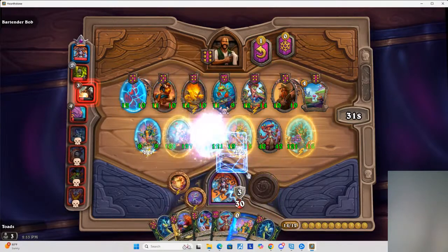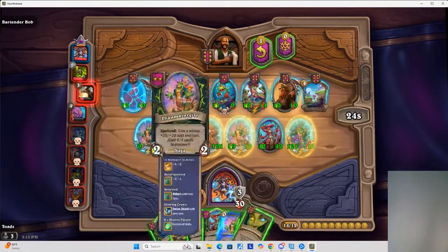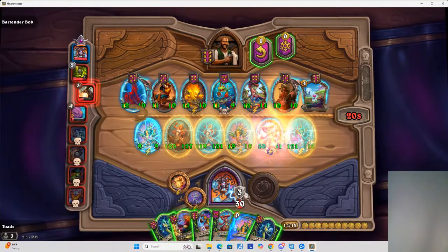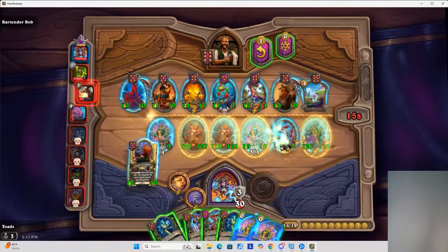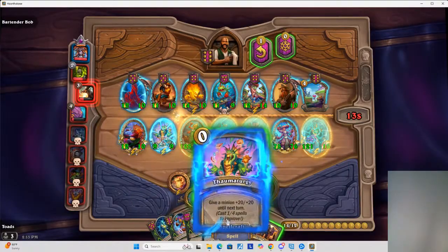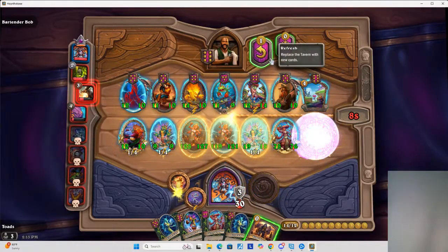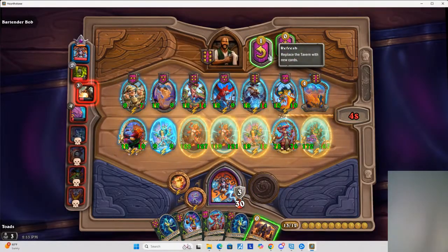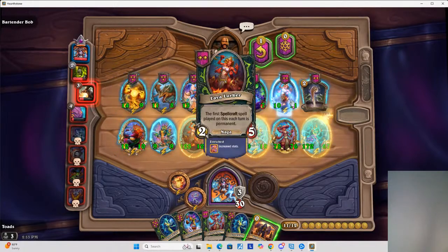Start by estimating time. That is, the hours or days it will take to complete tasks. That's because work hours affect both the schedule and the price tag. The estimate worksheet here is available in the exercise files. The work hours affect the schedule because it's built around how much time people can work on tasks and when they're available. Work hours affect cost because you pay people for the hours they work, as the labor cost in the estimating spreadsheet shows.